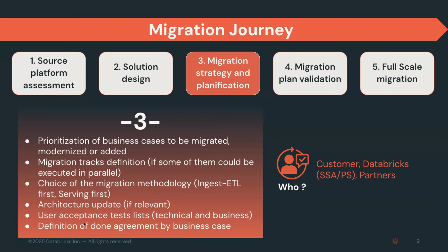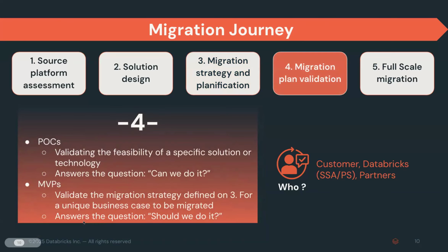But let's move next. During phase 3, we most likely have already identified the tool set and, let's say, the plan, but still it's on paper. Still it's a hypothesis. We probably have conducted some demos or some fail-and-try runs in terms of the tool set, but, super important, before the real work starts, we have a small, typically quite short phase of migration plan validation.